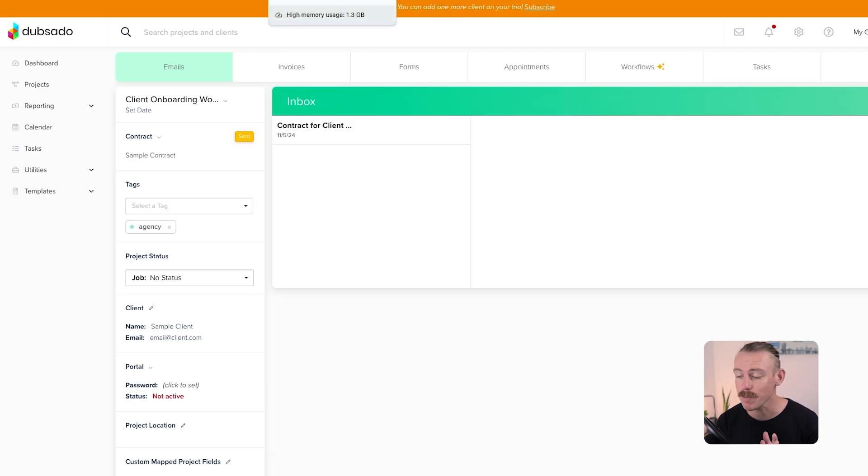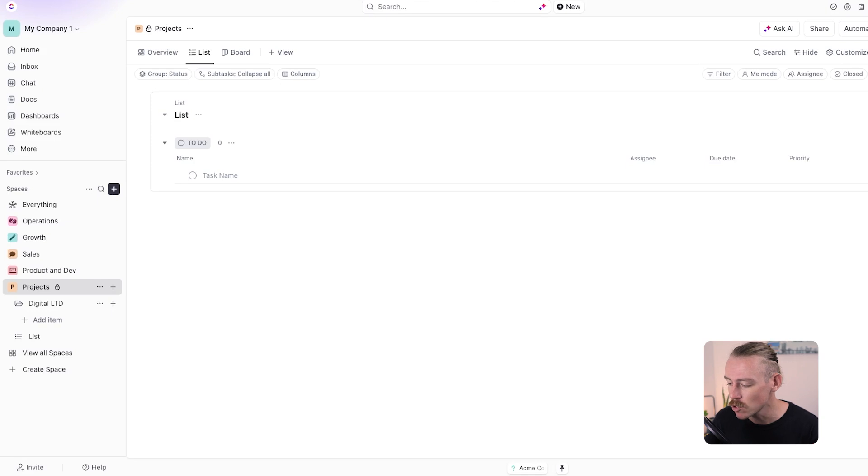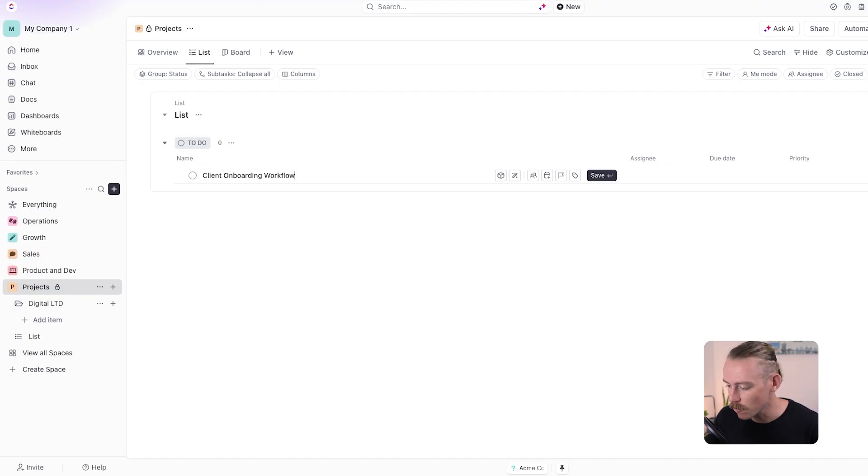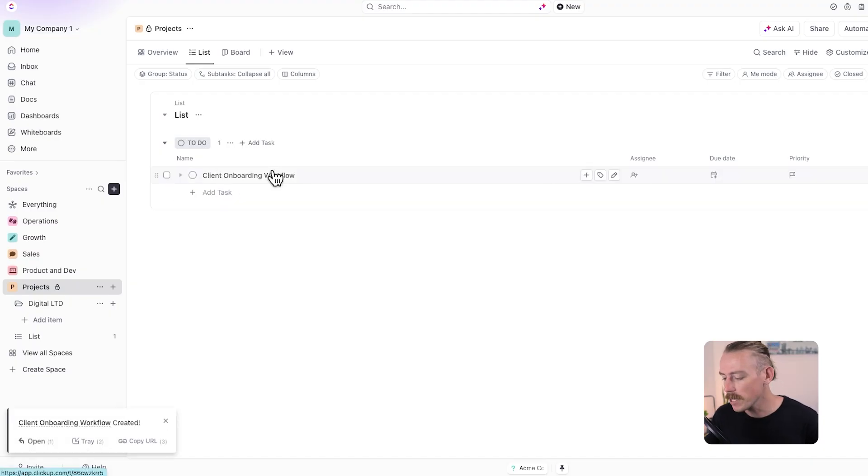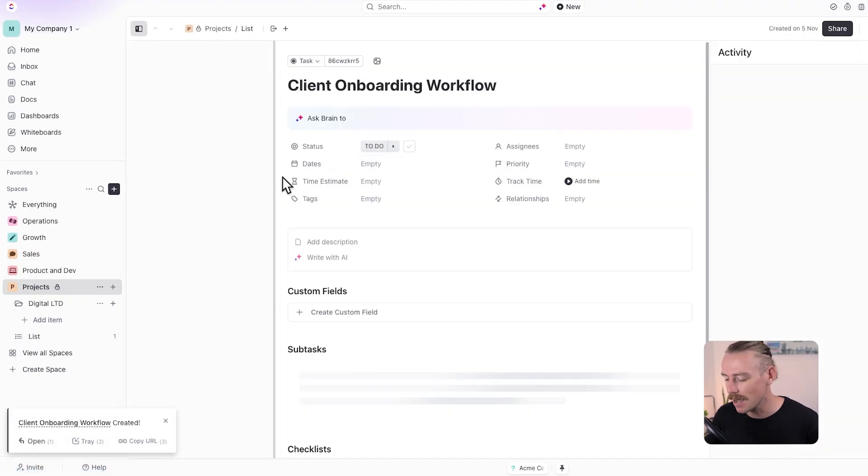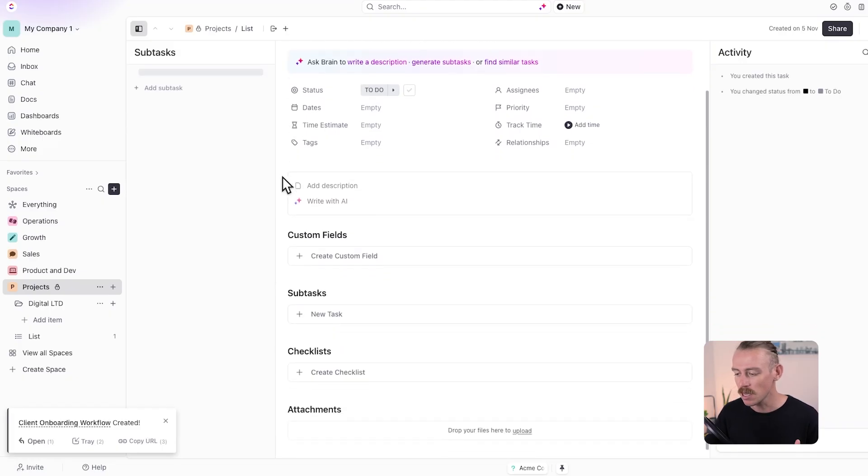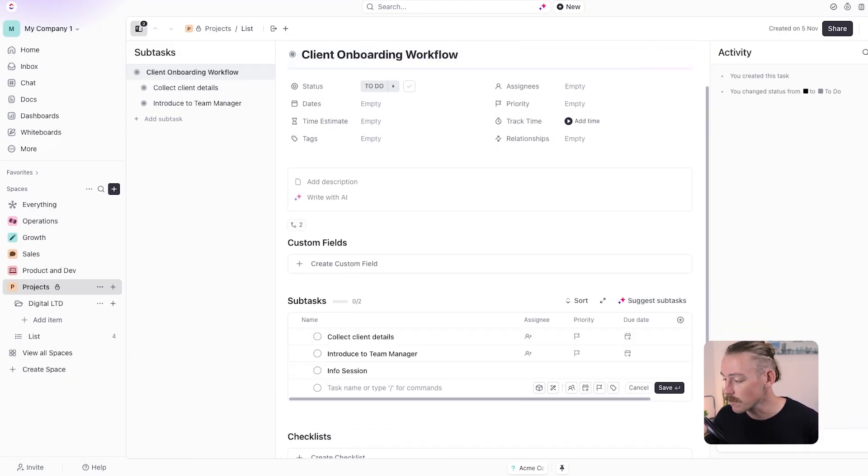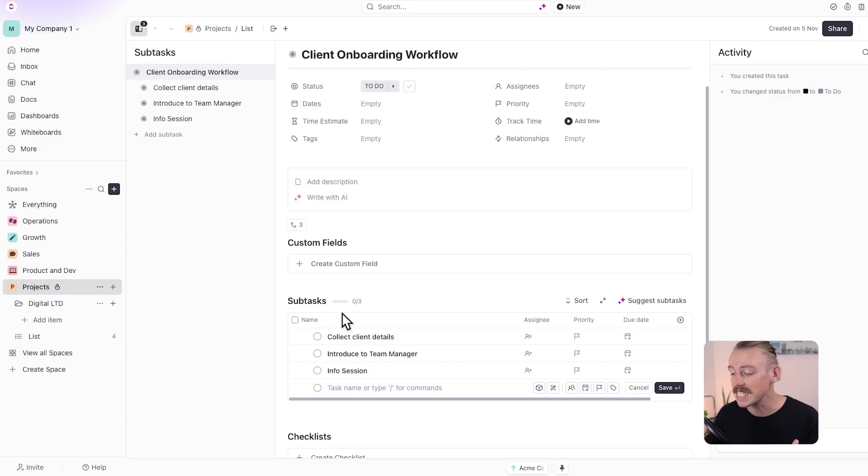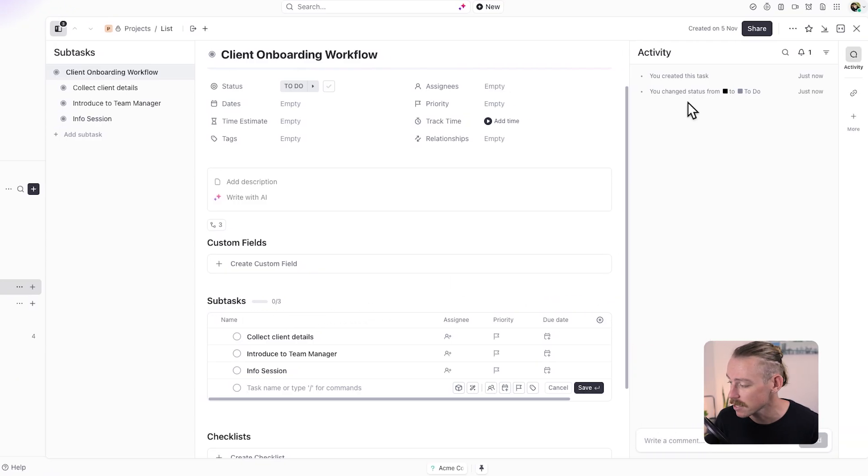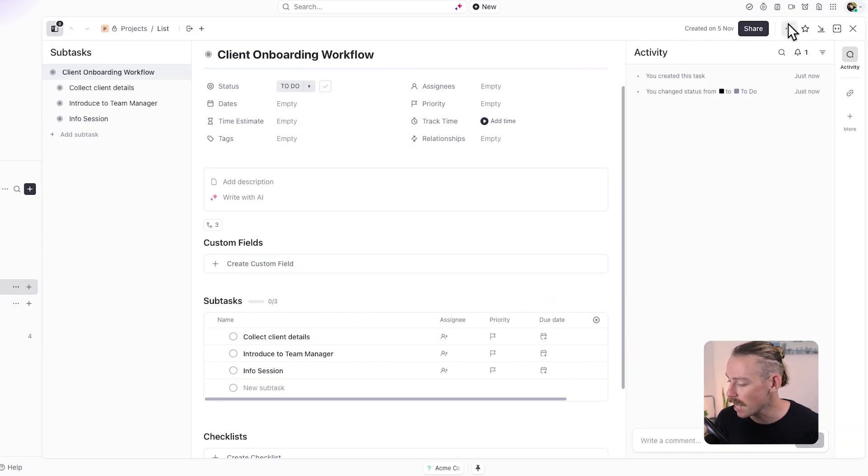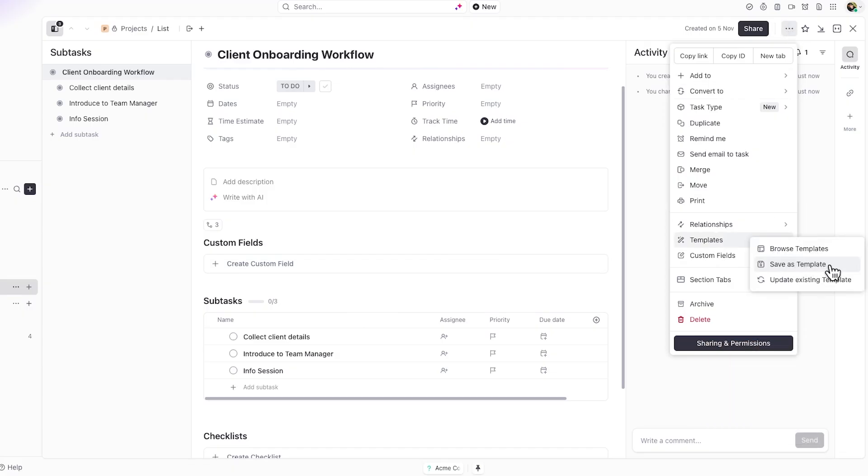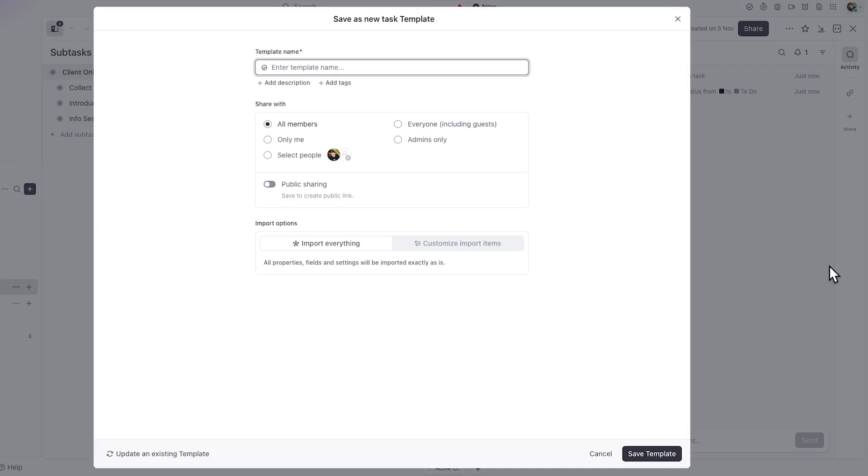So before we jump into Zapier and look at setting up the rest of the automated workflow, I just quickly want to show you something cool in ClickUp. So if we jump into ClickUp and create a client onboarding task, if we can spell it right, client onboarding task, then we open this bad boy up. What we can do is we can set up this task with set recurring tasks for onboarding, specific descriptions and similar tasks. Then we can create a template of our client onboarding task so that every time a new client comes in for onboarding, we have the same tasks ready. We don't have to manually create those tasks.